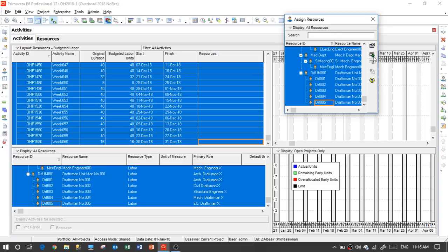However, in fact, sometimes it doesn't work that way. You can't just put a target of zero overhead booking and load the projects, and that gives you an indication about the cost of the projects, which is wrong, because people book without really working. I need the real hours worked, in the design team in particular, so it gives me an indication for future prices, for future projects. Okay, so this is a very good method to control.